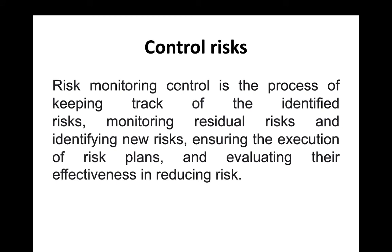Control risk is the process of keeping track of identified risks, monitoring residual risks, identifying new risks, and ensuring the execution of the risk plan. Controlling risk is similar to quality control — just as quality control tracks whether work meets quality measurements, risk control checks whether we are following through on the response plan we created for each risk. If we are on the same plan, there is no worry; but if we are not, it means we are out of our planning. Control risk ensures we are on the right track to face risks.